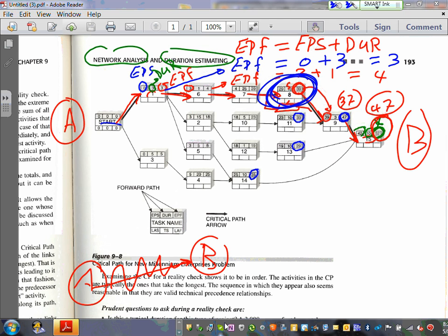You guys were doing power, and Adam was doing lighting, right? Can I give you some of the lighting to do, split it into a different path so it shortens the duration? And if all hell breaks loose, guys, the last option: I can't make you work harder, and I can't split the activities into another path to relieve that path. The last one is to pump money and resources into it.